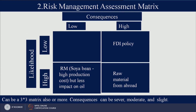Let us look at the second part of the risk management process: risk assessment. How do you assess a risk? Risk can be assessed through a matrix — a 2x2 matrix where the x-axis shows consequences of risk and the y-axis shows the probability of occurrence of risk. You can also have a 3x3 matrix with 9 quadrants by adding a moderate level between low and high.